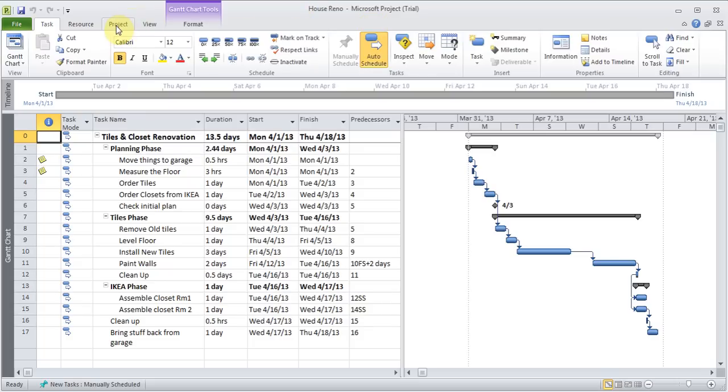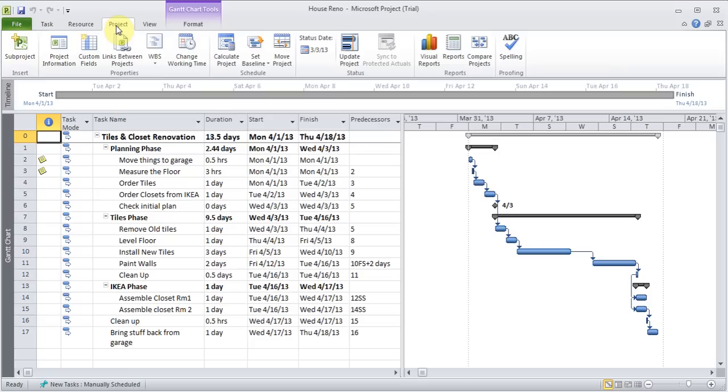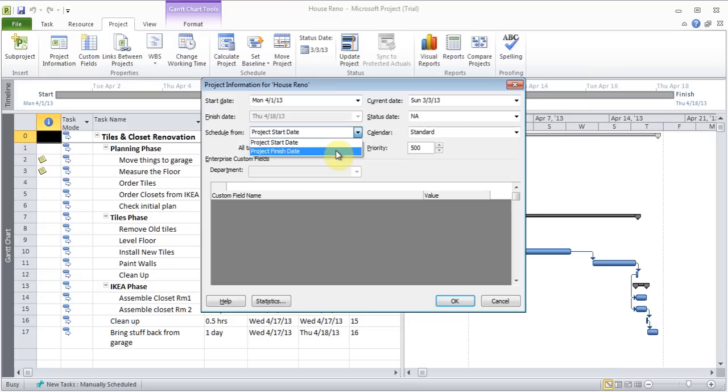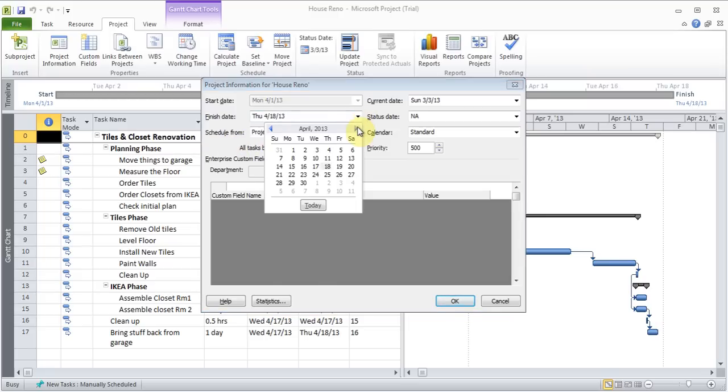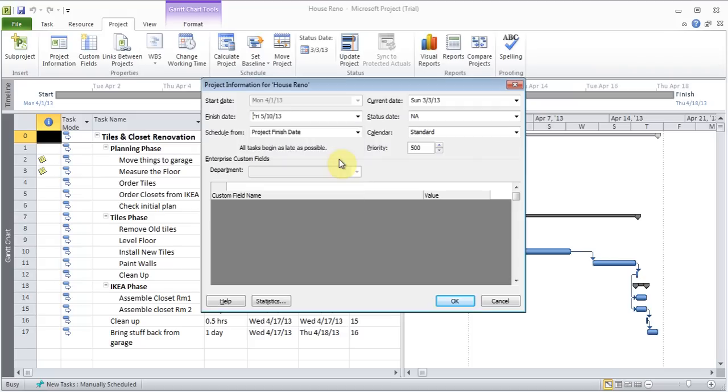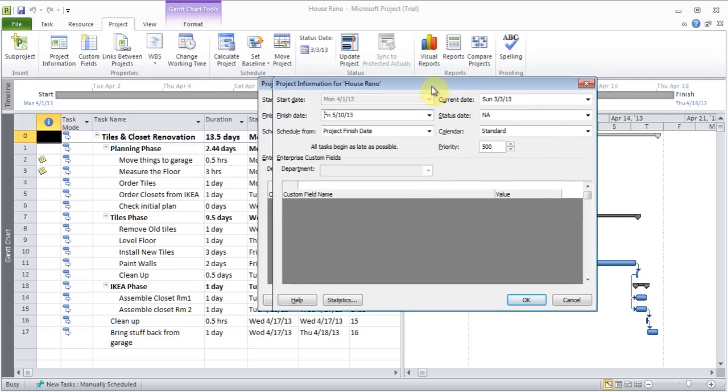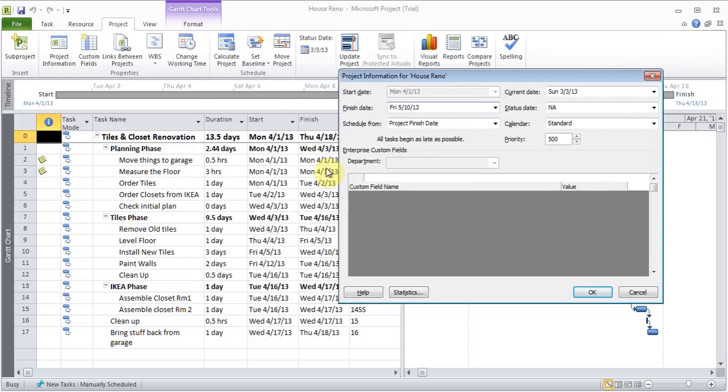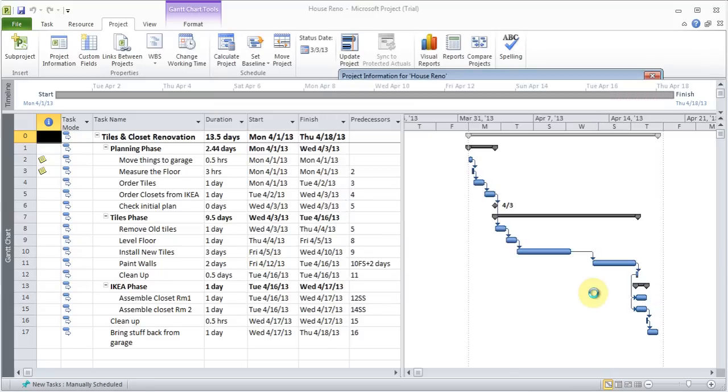So, if I go to project, project information, and instead of saying the project start date, I set finish schedule from the finish date, and I can say finish it by the 10th of May. Now, let's see what will happen to the start and finish date when I click OK.